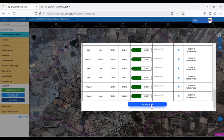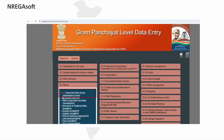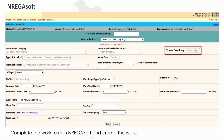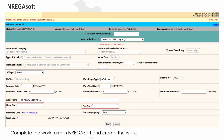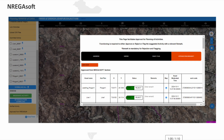Approved plans are finally sent to Naragasov, where work is created and estimates are generated. Naragasov displays a list of the approved works.